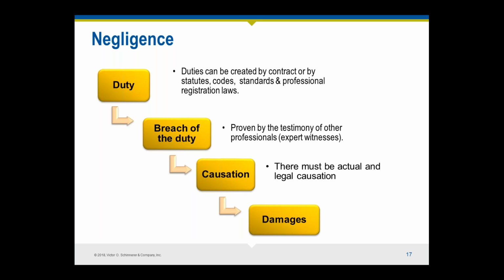So if you agree to things like the highest standard of care, that may increase the standard of care to one of perfection. If I'm a client and I get you to agree to meet the highest professional standard of care, anything goes wrong on that project and it's a gotcha. I can say, well, obviously you weren't perfect. You didn't meet the highest standard of care. You owe me damages. But that's not covered by insurance because insurance covers you for negligence, which is based on an ordinary standard of care, or a professional standard of care might be a nicer way from a marketing standpoint to say that to your client.